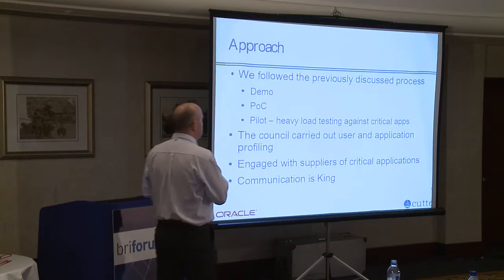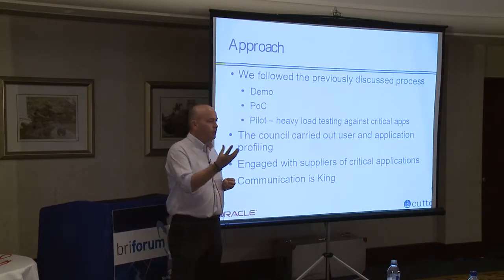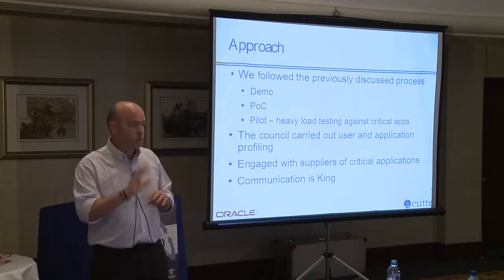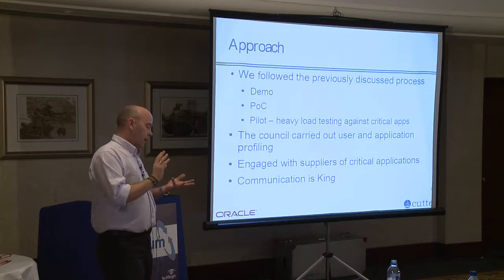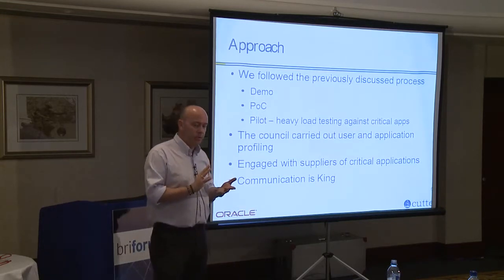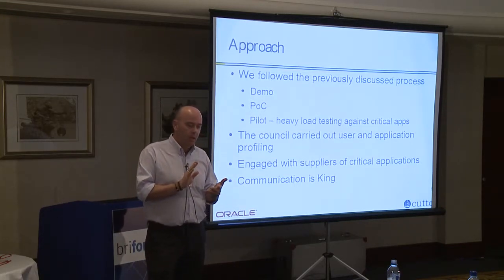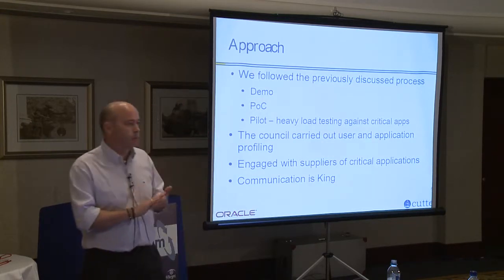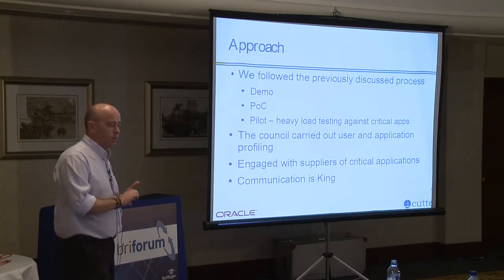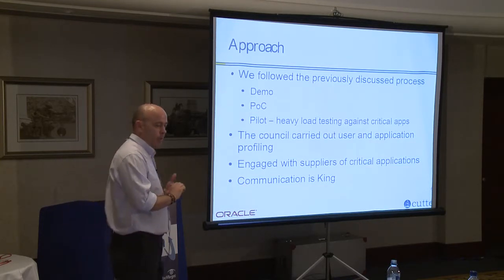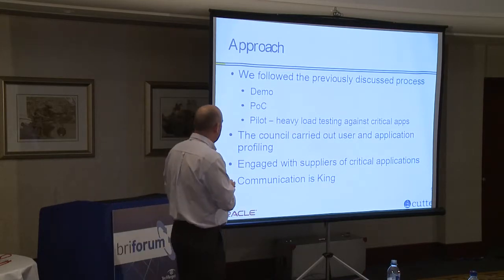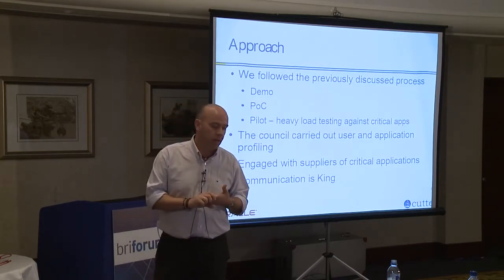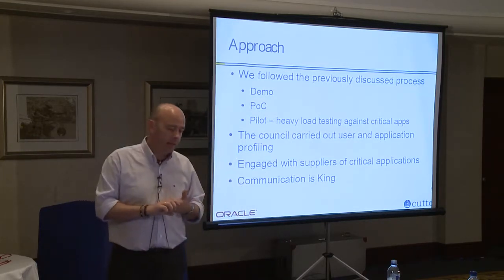That was done by using Oracle Virtual Desktop Client, fired up 200 times on a couple of laptops with AutoIT scripting running in the background, launching, interacting with, and shutting down applications, and the servers were run at 100% capacity for 2 weeks with no breaks, no downtime at night or anything. They were absolutely caned flat out for 2 weeks solid, just to make sure that we were comfortable it was ready to go, Oracle were comfortable it was ready to go, and more importantly, the council were confident that the technology was robust enough and stable enough. It took an absolute pummeling, and it came through out the other side.